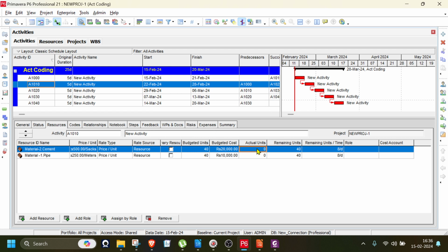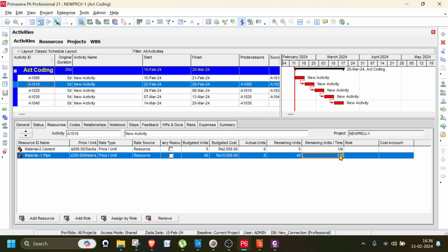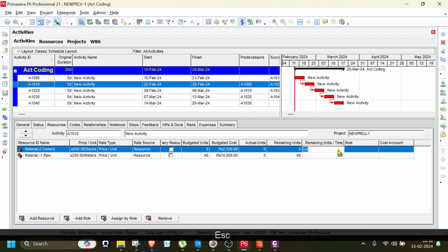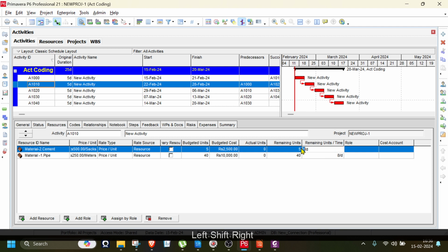Okay, here we go. Next. So here we should add 30 because there are 30 days. The budgeted units means that will take care. No, budget units for 30. Okay, that's it. And here you will add one shovel. Here you already added one more project work involved. Here you will add labor. Here it is 10 units, 5 days. It is 10 into 5, which is 50.